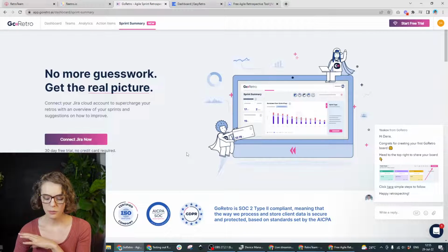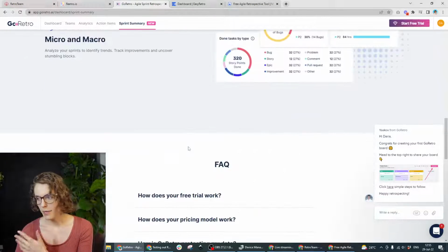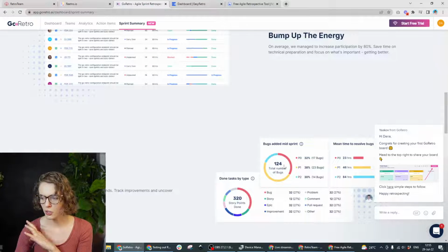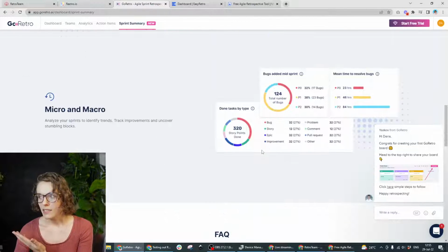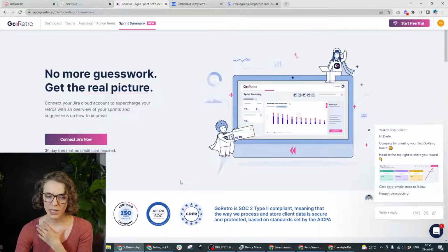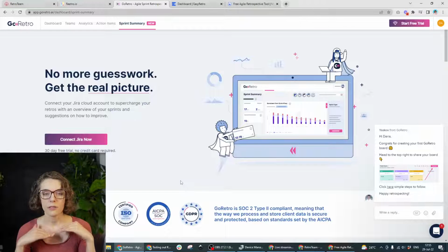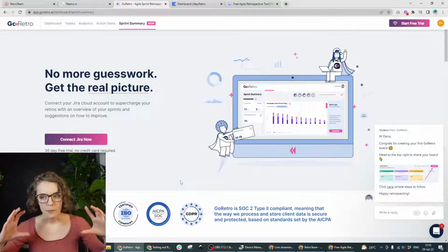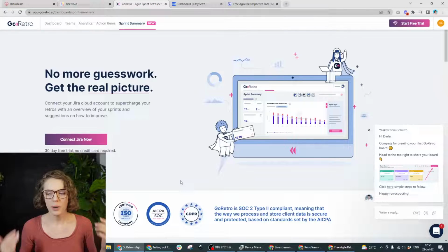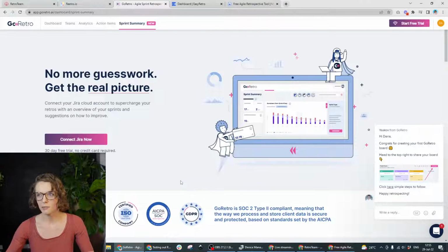So the sprint report for me is not that. Having that velocity calculated to help your team plan in the next sprint planning, that's great. But it's not just about how many items you have completed. I feel like if you're just looking at the numbers, it's not really giving you the information that you need. That's why I usually like to list out all of the deliverables that have been delivered, or maybe bugs that have been fixed, actually giving more information about the work that the team did.